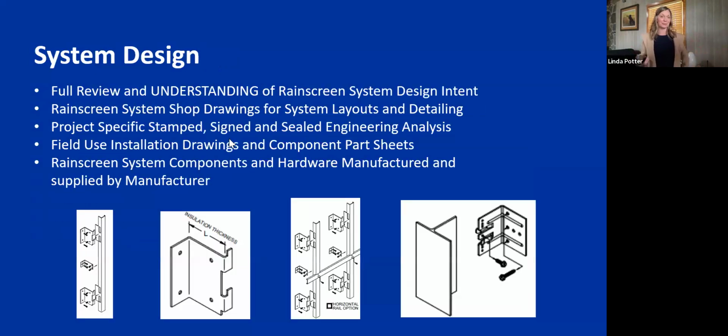successfully than maybe others. When it comes to system design, I think it's just really important that we slow down, and we hope that whoever's taking on that engineering does a full review to fully understand what's needed for a Rainscreen system and that design intent that was expected. And is that what you're getting back from the contractor you're asking to do this? Rainscreen systems, they should give you full shop drawings, system layouts, and detailing.